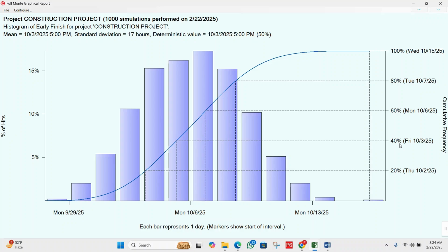Then identify which tasks contribute the most schedule risk. Clear? If delays are not acceptable, look for the tasks with the highest uncertainty and adjust. Use contingency buffers for higher risk activities, then prioritize critical path tasks to minimize delay risk.